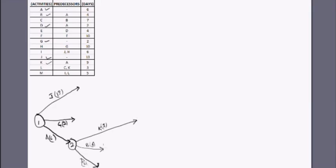Now let's check what follows G. H follows G. We also see that activity I follows both J and H, which indicates that J and H should end at the same node. So we extend and merge them at one node. Activity H takes 10 days to complete.